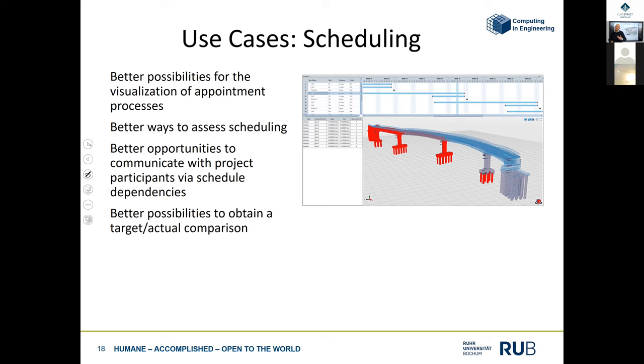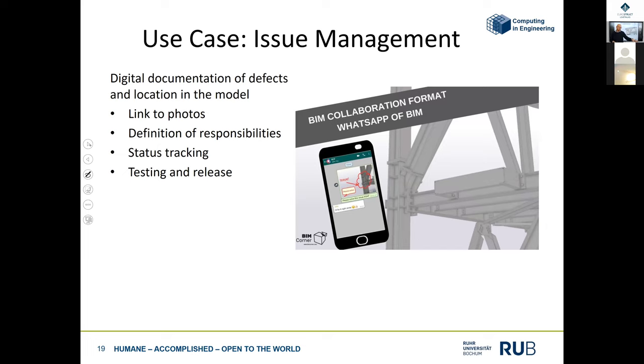Then you can go into your office and check how many issues we have in a certain area, where the locations are. Maybe you can also find some interdependencies, or do a data analysis. And in the end, you can also perform some tracking. So you can say, okay, this is an issue, you have to do some rework, and please give me feedback.